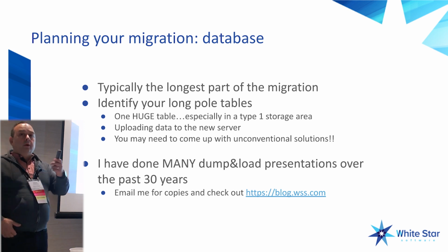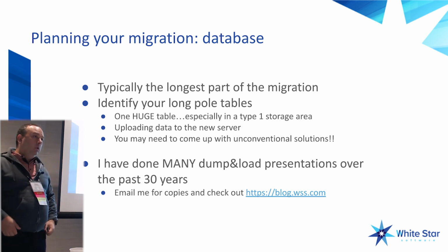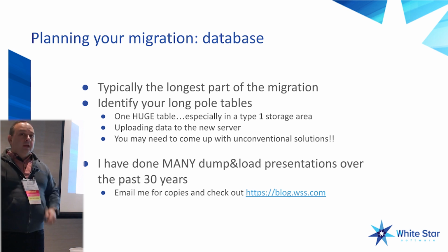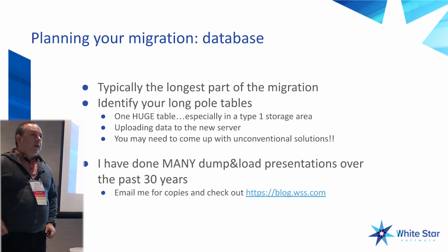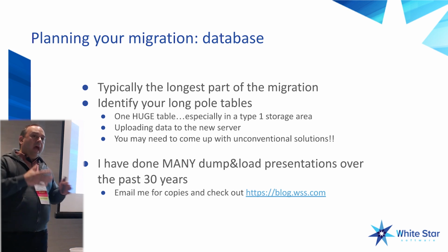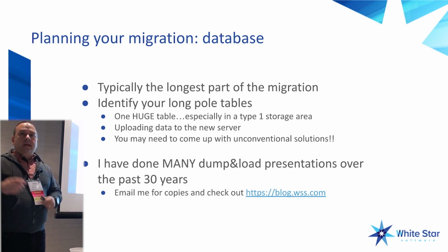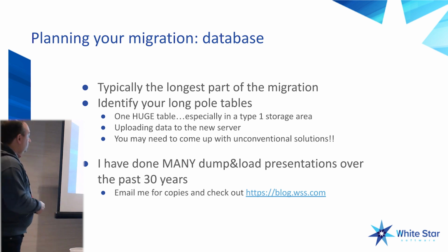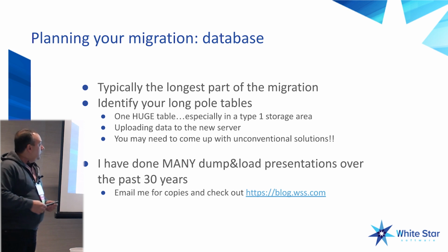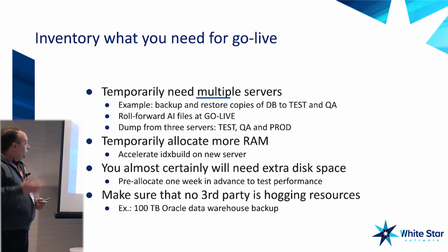Or worst case scenario, you use Pro2 dump and load, which kind of uses change data capture to keep that other database in sync. And so the downtime is quite minimal, but obviously the effort ahead of time is much higher to get all of that set up. Good. All right. Multiple servers, more RAM, more disk space, of course.